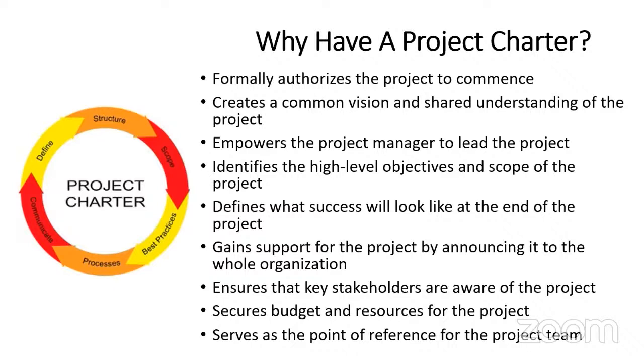Sometimes you hear things like award letter, that this company has been issued an award letter. Now, a thorough award letter is supposed to contain the project you're doing, the scope or statement of work for the project, the expected deliverables, how long the project will be, and the expected cost for the project.